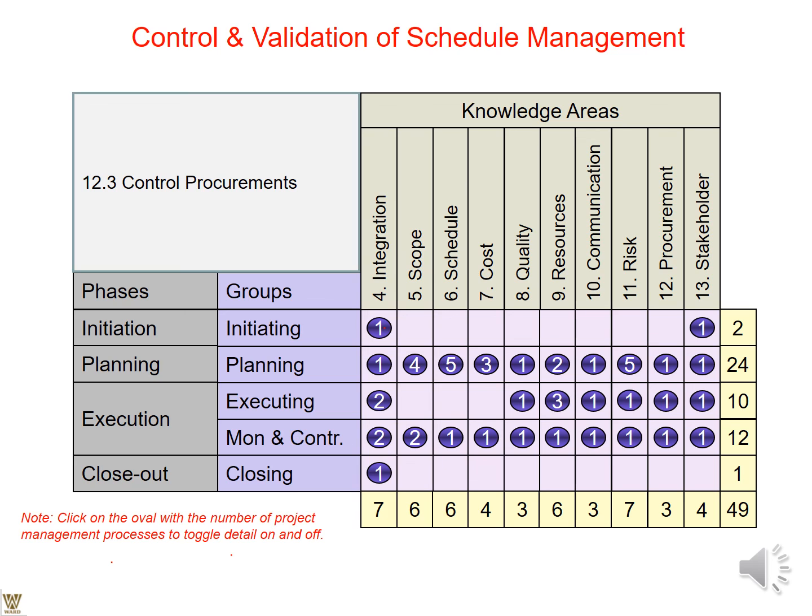Then is procurement. If the prices of the raw materials are fluctuating, you need to ensure that when prices are at the bottom rung, you plan accordingly. Please identify and order a suitable amount of resources at that optimum time so as to smoothen the effect of the price variations on the project cost.